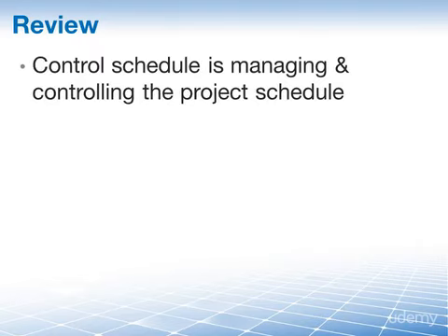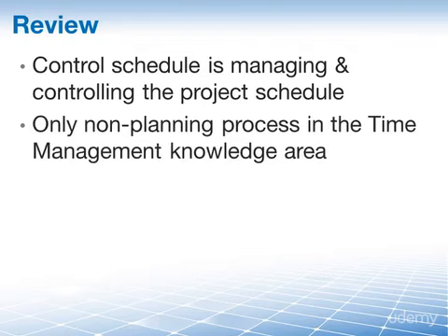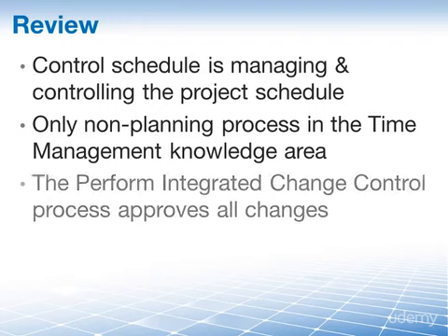Let's review. From a time management perspective, control schedule is about controlling and managing the project schedule and any deviations from the schedule baseline that might occur. Control schedule is the only process in project time management that is not part of the planning process group. It is in the monitoring and controlling process group. All changes must be approved through the Perform Integrated Change Control process.